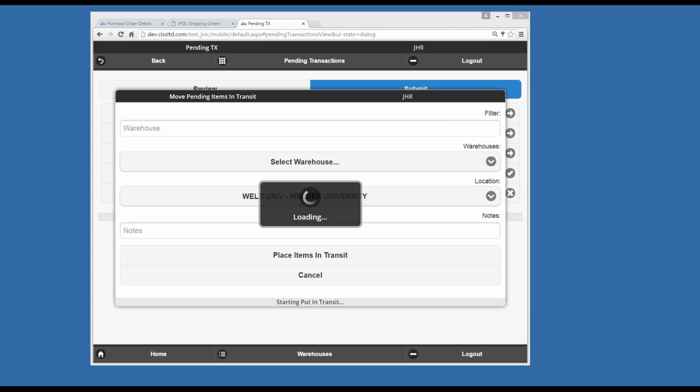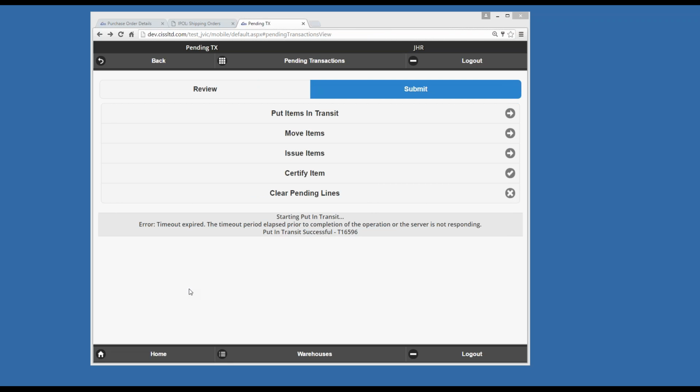What we're talking about is creating a custom customer acceptance form rather than having the guys type it all out and missing something. Then all the items will be there, and there would be a note section for any of the installation details that we normally have to write out. Then they present this to the customer, who signs off on it, and it records the signature at that point. It can either send it via email to the customer for their reference, or send it directly to PM support for project acceptance. Yes, that can be set up, automatic emailing and capturing the signatures.